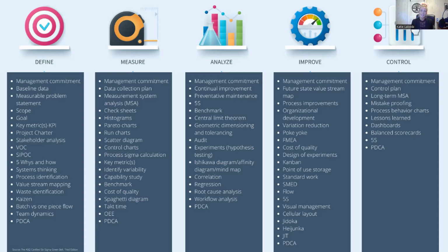No, we're not done yet. We need to go to the control phase, which is the final letter in the DMAIC process. So in the control phase, first of all, this could last a week, or it could last months. It depends on how much or how fast you can gather data. Now, if you're making system changes to your systems, you can sometimes be able to see those system changes right away and be able to gather your data to basically prove that your change worked. Sometimes, though, we have processes that don't get run every day or don't get run every week, or maybe they're only run once a quarter or maybe even once a year. So you may stay in that control phase for an extended period of time,